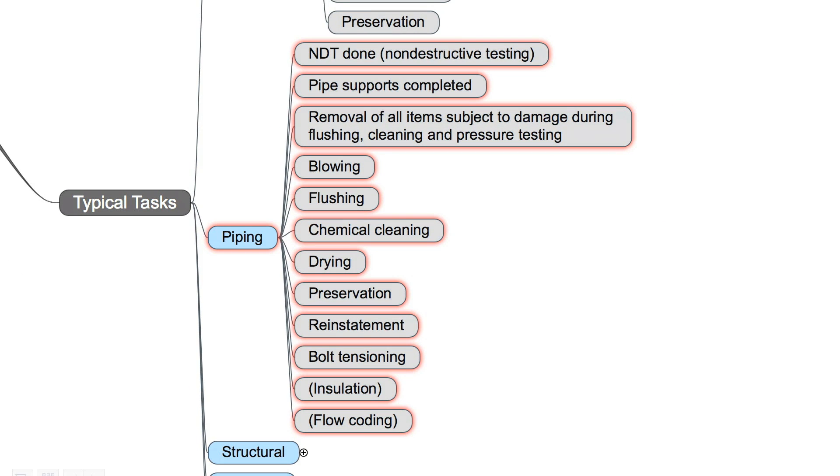Typical tasks for piping are, for example, NDT is done, non-destructive testing, pipe supports completed, all items subject to damage during flushing, cleaning and pressure testing are removed.